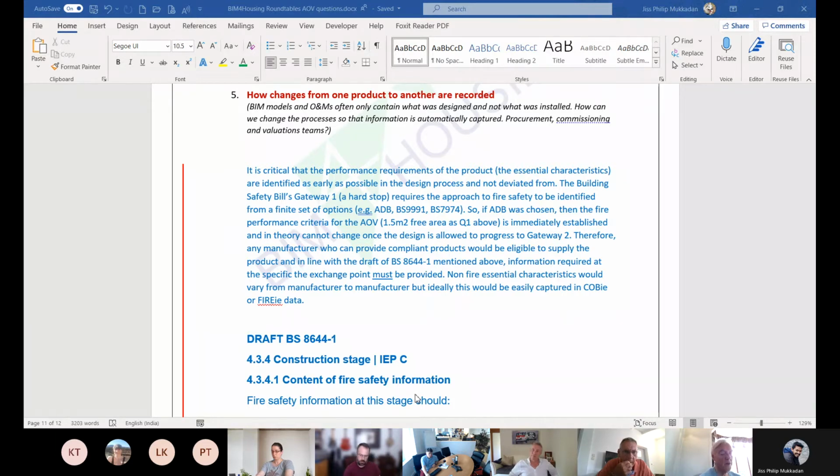Because unless we can go from what was being intended, that the specification was supporting, to what was actually being used, then we don't have a proper change management process. So we're pushing for that in the construction side of things, which I think we're getting good buy-in, because frankly, that's the way it always used to be done. And we've lost the habit of that.